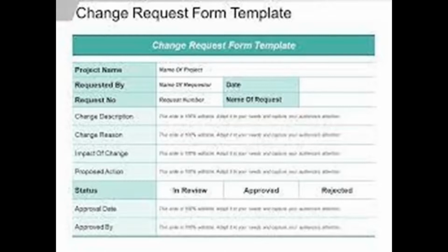Other change requests cover the needed preventive or corrective actions to forestall negative impact later in the project. Any project stakeholder may request a change. Change requests are processed for review and disposition through the Perform Integrated Change Control process. Change requests can be initiated from inside or outside the project, and they can be optional or legally/contractually mandated.